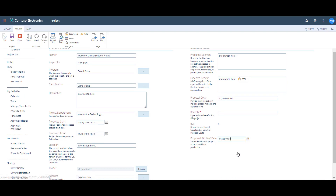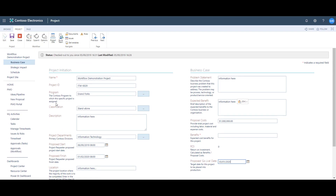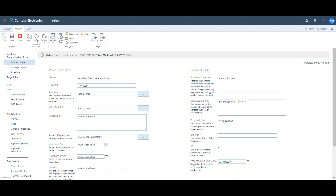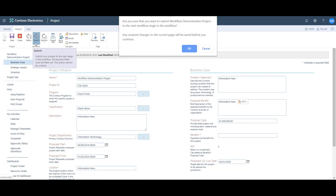Now the business case is complete and I'm ready to submit my project to the next stage of the lifecycle. I go up to the project ribbon, first need to save and wait for the project to finish saving, and then in the workflow section I'm going to click Submit. One thing to remember here is that in order to submit a project you must first be in edit mode — if not, you'll see that the Submit button is grayed out.